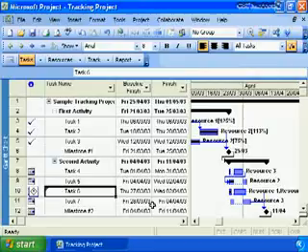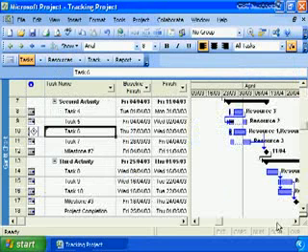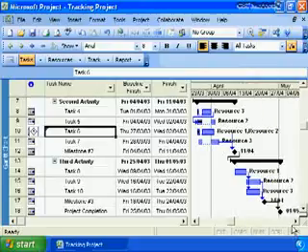We look at task number 7. Well, there's not much we can do to that. That's already pretty aggressive. And we begin to look forward in our project saying, what else can we do to improve our project delivery situation? And we look at tasks 8, 9, and 10. They're all relatively short tasks, so adding additional resources probably doesn't make a lot of sense. But we begin to look at our task dependency, saying, is task 9 and task 10 truly dependent upon task number 8?